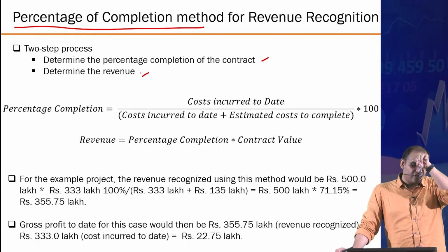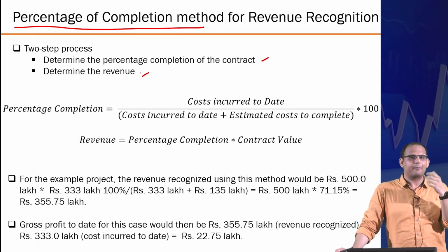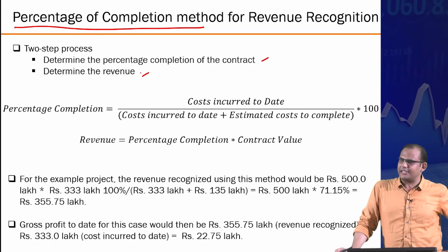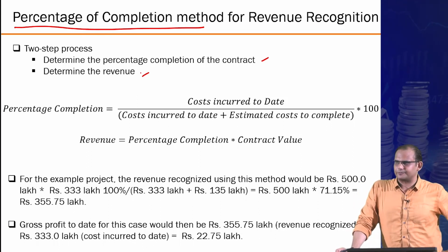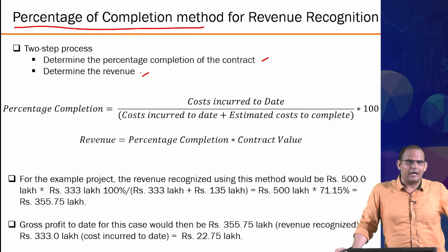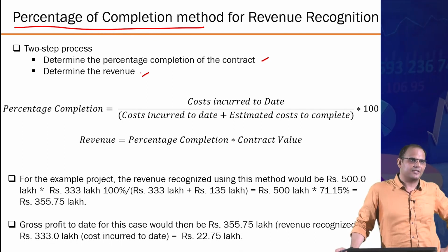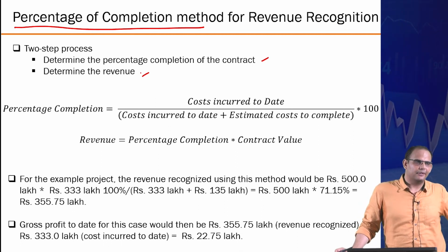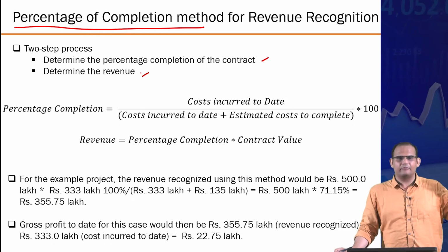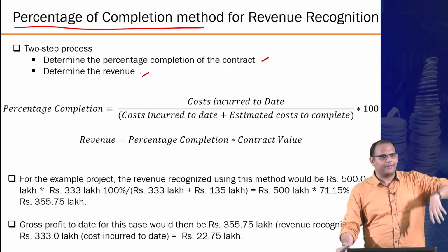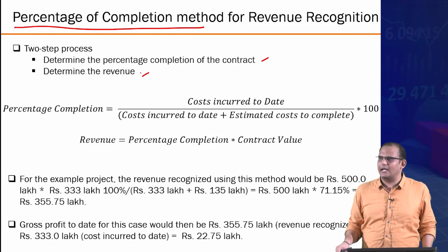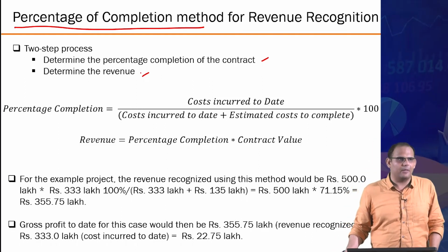Now, percentage of project completion, how can you determine? What are the various ways to determine percentage of project completion? Based on the quantity, okay. How do you do that? Like some examples, a small example. Yeah, so for example, we saw that of 1 lakh cubic meter of concrete, 60,000 cubic meter has been done. So your project completion is about 60%.